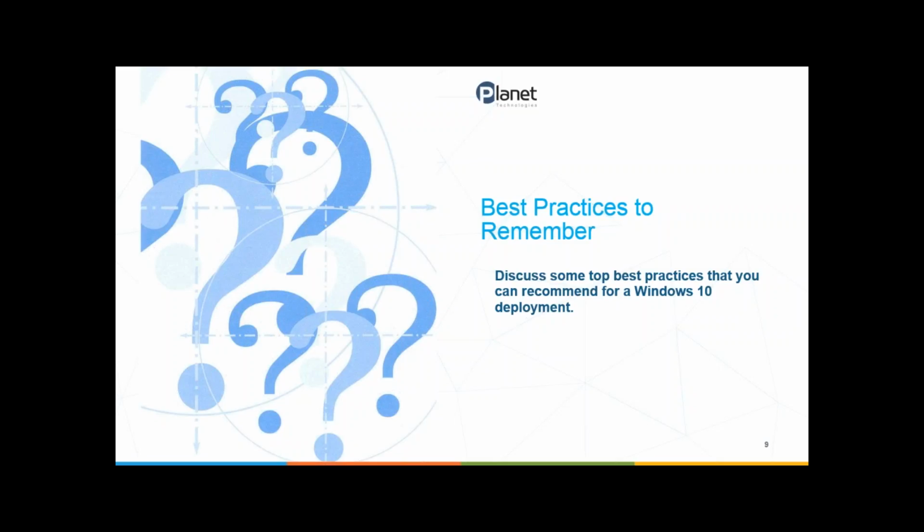Also, as I've said before, we do a postmortem for every project, but typically we do a postmortem for every phase as well. What went well with that iteration? What went wrong with it? What can we do to ensure that it works better the next time we push out? So from that postmortem, obviously, Corey, if you can go to the next slide, please. We're going to go to lessons learned.